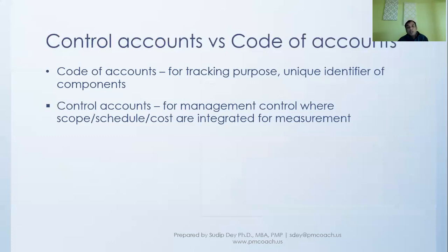For example, if you are developing a website for your marketing team and there is one particular page which really tracks how many clients they are getting, what has been the communication with the client, and what has been achieved through client communication, let's say, then the whole thing will have many different components, but it will be put together as a control account, so that management can look at the scope, schedule, and cost as we move through the project for the full page.